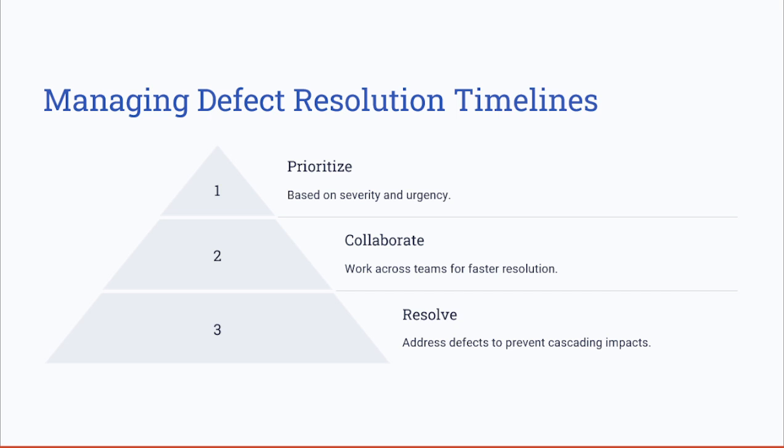Whenever you identify a defect, you need to deal with it immediately, because keeping the defect without documenting it and taking corrective action can let it escalate and cause high severity. It will have a higher impact on the project timeline and constraints, and on customer or stakeholder satisfaction when they find that a defect has escaped during your project. Timely resolution prevents cascading impacts on the project schedule and costs.